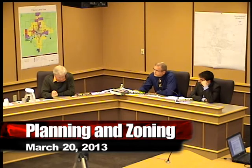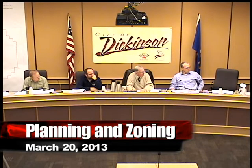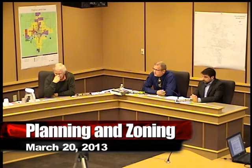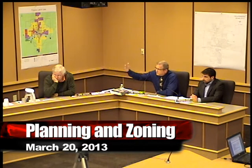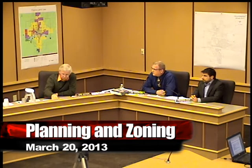So, Mr. Corton, you don't see a problem with recommending a preliminary plat because you wouldn't even put this on our agenda for 90 days, right? I'm not saying that. I'm just saying that if I had to project either 60 or 90, I would definitely weigh heavily towards 90. I don't think 60 is going to be a conceivable turnaround because when you look at packet materials, advertising, and the rest, it's not as if we get it done on the 60th day and I come in front of you. No, this has to be wrapped up in a bow 45 days prior to that because we have to advertise even earlier than that. So I don't see that a 60-day turnaround is conceivable for this project, nor the subsequent one as well.